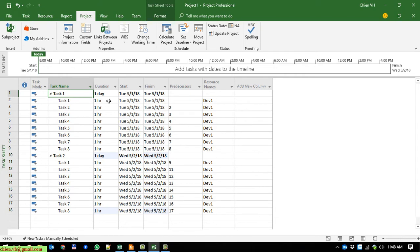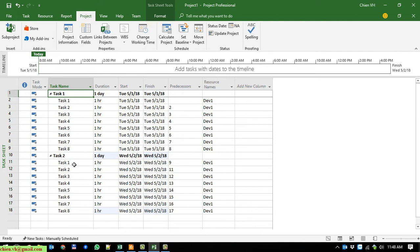That means we will finish Task 1 in 1 day, and the same thing for Task 2 — it also finishes in 1 day. You can see, if you look at the Start and Finish columns, we have the start date of 1 May and finish on 1 May. Task 2 starts on 2 May and finishes on 2 May.